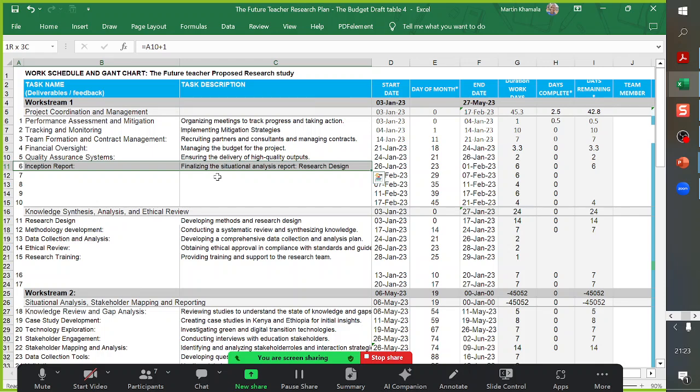Inception reporting is just mostly the same thing that you reiterate: this is what we plan to do, this is how we plan to do it, these are resources. So you're not even giving any report. You're not even giving any output in an inception report. It's just to come to an agreement with the client on the approach, on the objectives, on what you want to achieve, the outputs and so on, and the work plan and the budget.